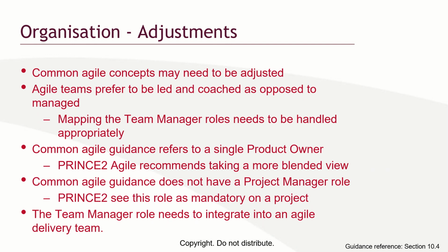Okay, for example, if a Scrum team is working very effectively, it could be damaging to a team manager role. So in Agile, we have what they call a team manager role. In Scrum, you need to map the team manager role to the role of a Scrum Master instead of duplicating the roles.